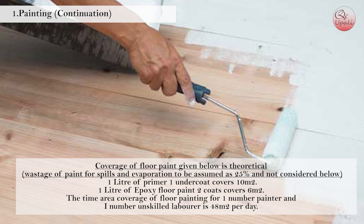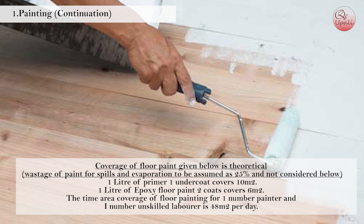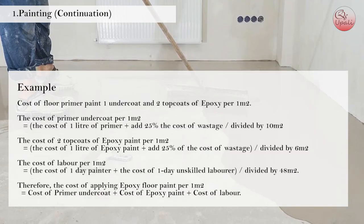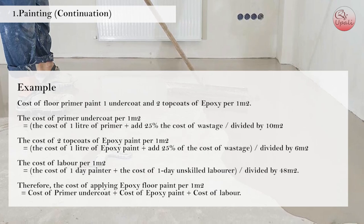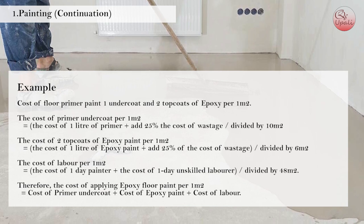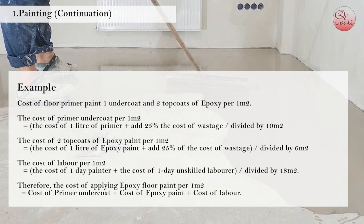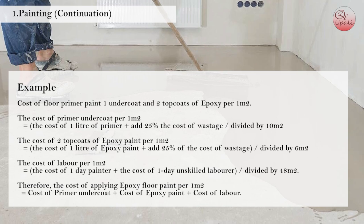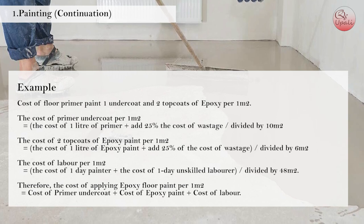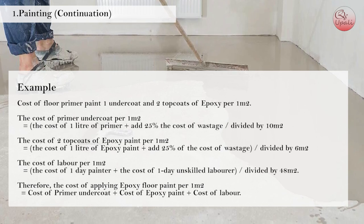The time area coverage for floor painting for one painter and one unskilled laborer is 48 meters square per day. Example: cost of floor primer paint, 1 undercoat and 2 top coats of epoxy per 1 meter square. The cost of primer undercoat per 1 m² equals the cost of 1 liter of primer plus 25% wastage, divided by 10 m². The cost of 2 top coats of epoxy paint per 1 m² equals the cost of 1 liter of epoxy paint plus 25% wastage, divided by 6 m².